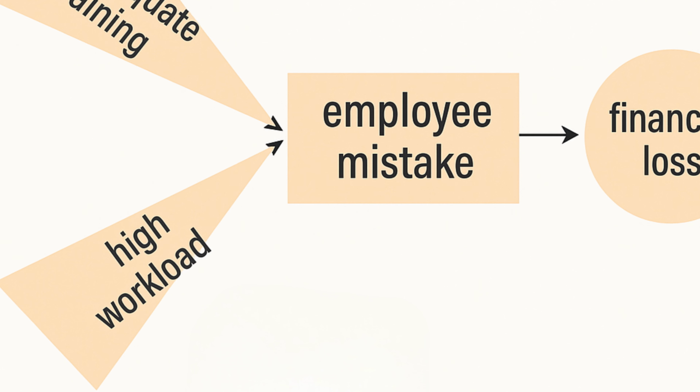So in terms of describing the risks, so many people use shapes to do that. Normally, the triangle is used for showing the cause, and then the rectangle is used to show the event, and then a circle is used to show the impact, like this. You see the way you are seeing it on the screen. So it is very important, when you are a project member or project manager, that you are able to distinguish the 3 items: cause, event, and impact, and then show that in a diagrammatical way, like what you are seeing on the screen.